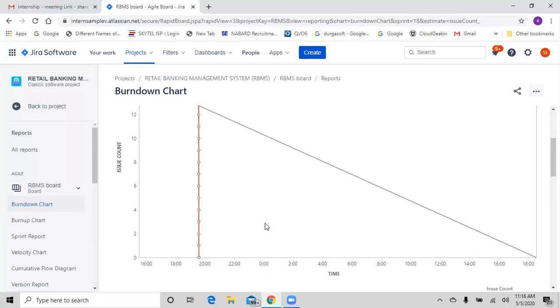Yes, but according to the software, how can we compensate for that, because it's taking the next day. Not a problem. Here I'm telling you how people consider it in real time. Here we can't do anything, so we may not be the responsible persons for this gap. But in real time, if such a huge gap is there, then people will think, because being a product owner, if I see this burn down chart, I can simply understand you people are overestimating the story points and keeping yourselves idle most of the time. This is my understanding.